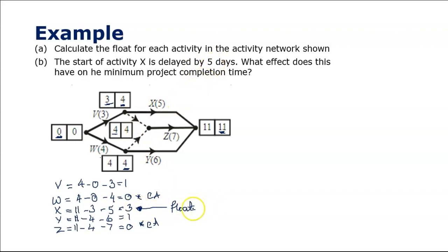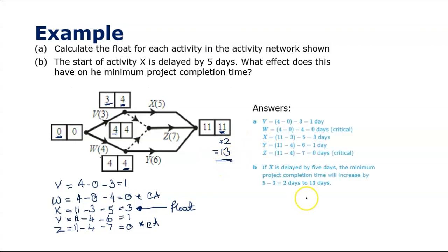You can see therefore that would make a difference of 2. 3 days won't matter. 5 days means it's 2 overdue. So I think the effect will be it won't take 11 days. I think I can add 2 to that. I think it'll be 13 days. Let's see what the answers say. 13 days is what I wanted. They are all right.